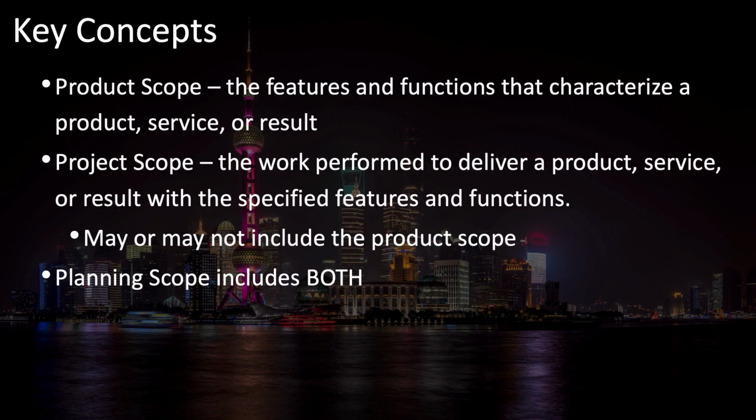But definitely, the planning scope includes both your product scope and your project scope. In other words, your product scope is what you're going to build, and your project scope is what you're going to do to build that product scope. And your planning scope has to include both, not only what you're going to build, but what you're going to do in order to build it. And that includes all of your project management activities as well.